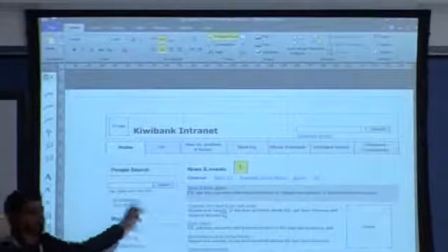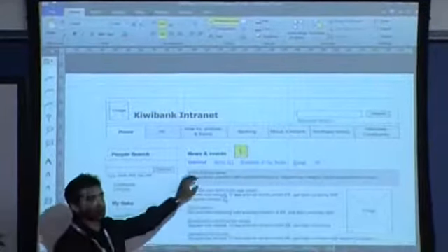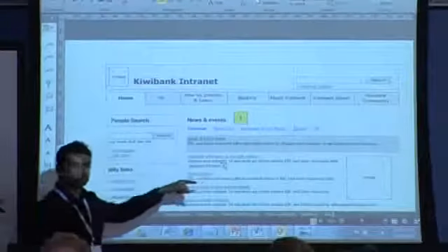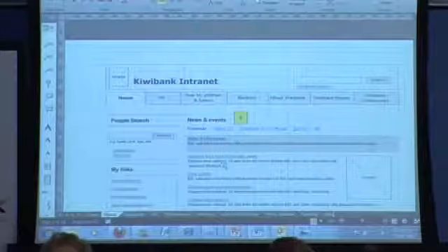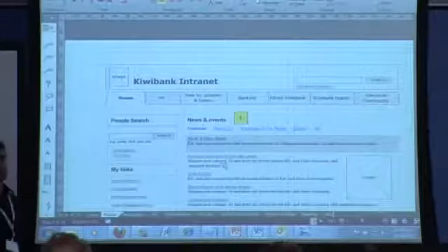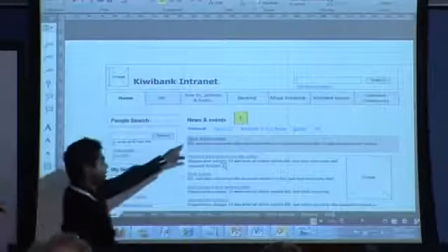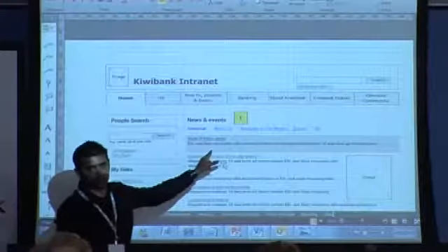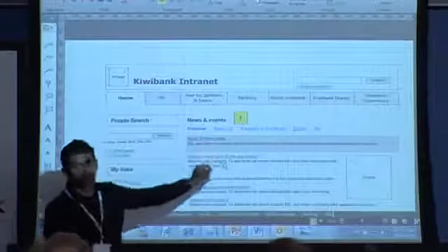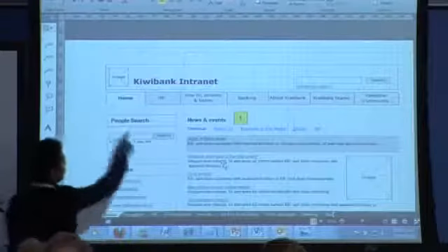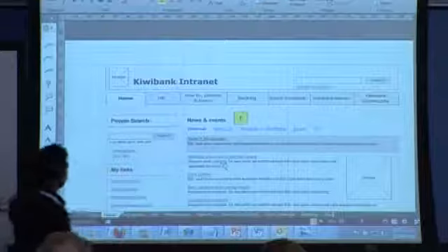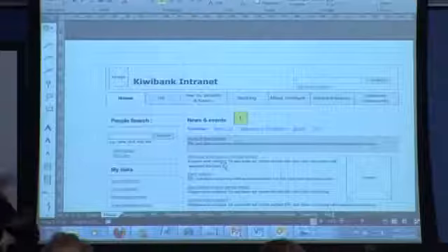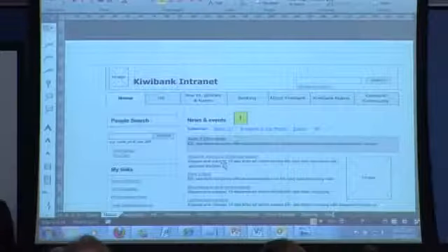So when we go and talk to a developer, we can say that's how it's going to work, and then we can maybe break it down into another sub-wireframe which explains the functionality. So without creating functional specs, we can go with the wireframes, and then you can have annotations of how it's going to work, and that is going to be a SharePoint alert that gets generated, and then that is actually coming from a SharePoint list created in this area, and so on and so forth. So all of that was converted into sites, and then that was Webpart. So we could visually look at it and go, before we built it, these are the components of the page, and so on and so forth.